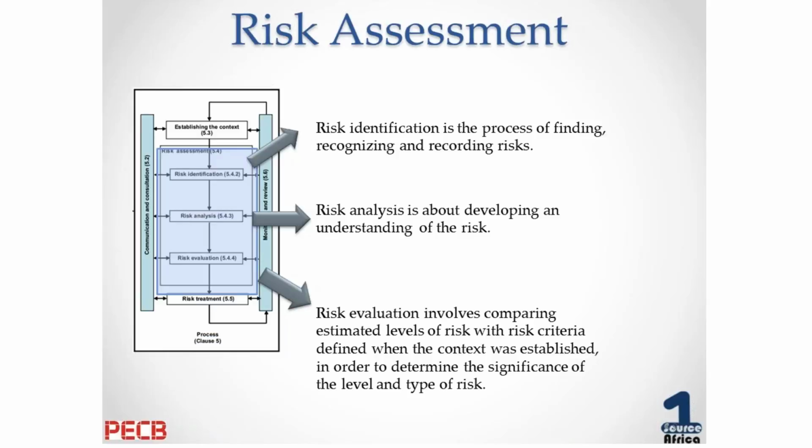During the context setting, we define what should be acceptable as a risk to us and what not, and we would compare it to that then. This is in order to determine the significance, level and type of risk.